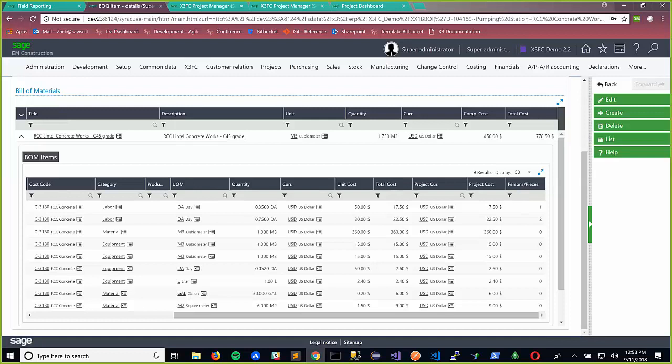But this is a little cleaner because a lot of times, especially when we start looking at import data, we weren't getting those number of people. So if we don't get the number of people, we'll default it to 1 and just assume that 1 person is consuming that whole time. And from planning purposes, somebody could go through and say, no, we got 4 people are going to be on that job and 3 on this thing. So, does that make sense?